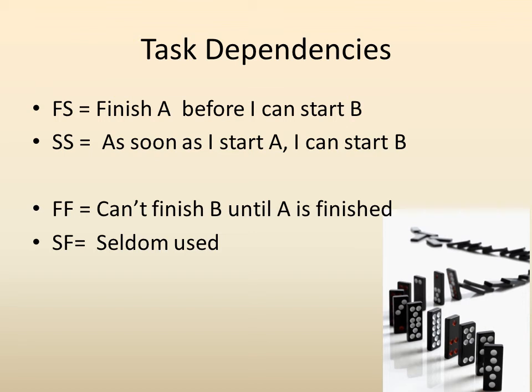Some that we seldom use are finish to finish, where we can't finish task B until we finish task A. And also, we never use start-finish. What we usually find when we go to do a start-finish dependency is that we've actually flipped around backwards a finish-start dependency.